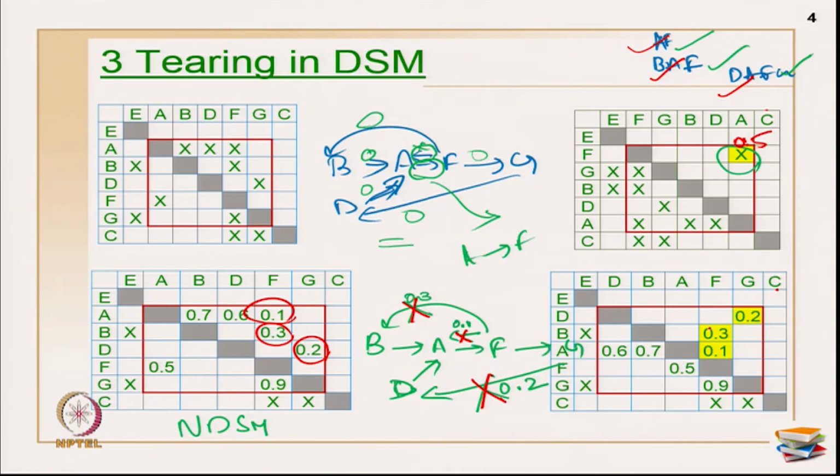but I am going to make 3 assumptions and I am going to break all my weak dependencies. Either I am breaking one medium dependency and I am going to use this as my sequence, or breaking 3 dependencies and I am going to use this as my sequence. So, now which is the better sequence among the two, that you will not be able to see just with the tearing process, because you have to evaluate with the help of an impact.